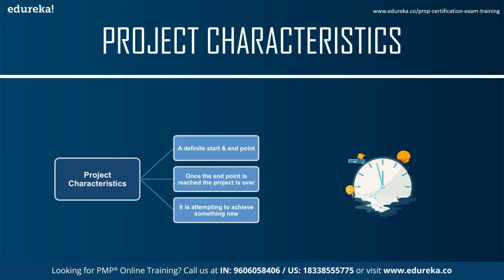The second question is, does the project have a limited time frame? The answer would definitely be yes. The start date of this project is today and it will end by the end of next year. It is definitely a temporary endeavor. Third one is, is there a way to determine when the project is completed? Yes, the kiosks will be installed and the services will be offered from them. So once all of these are installed and operating, the project will come to an end.